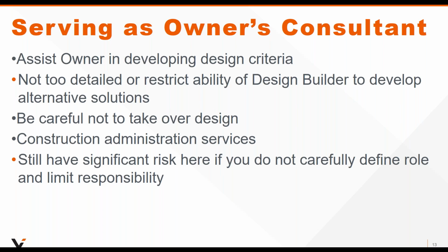If you do take over the design, and the subsequent design builder is obligated to follow that by their contract, then what happens is that it could open up the owner to those types of Spearin-type doctrines that we talked about, because a court may well look at the drawings and say, well, owner, you actually gave the solution to the contractor.